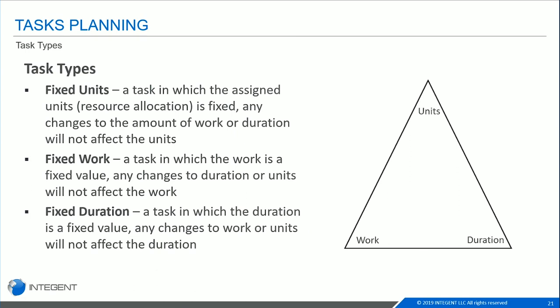So fixed work is where the task is what remains consistent or is a fixed value. Any changes that you make to the duration or resource units will not affect the work that is associated with that task.